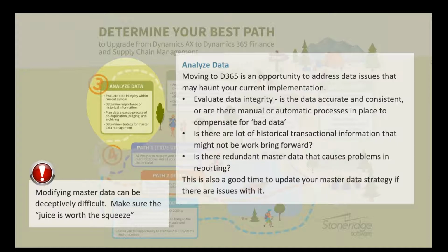Remember, when you're going through this process, it's not only the product dimensions that you've changed. It might be the product history. It might be the on-hand inventory, the reservations if you're using that, the sales orders that are midstream that need to be converted, the production orders that may need to be impacted as well. There are all these different areas that can be impacted. And I would say the number one area, if I look at our implementations or even prior implementations I've done in my past lives, is that data is where the scope explodes before you know it.